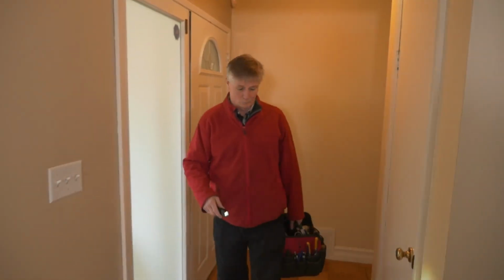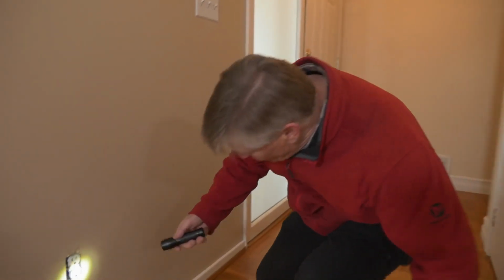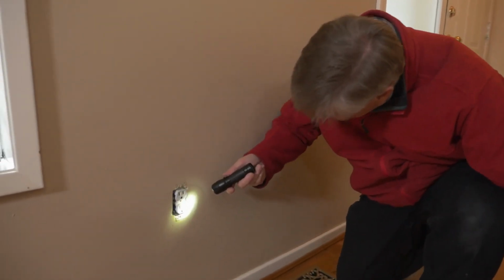Really, this is also the time that we want to have our home inspection. Let's say that you're building an inventory home. The builder is going to schedule your blue tape walkthrough for, let's say, a Wednesday. What you want to do is call your home inspector and try to get them out there on Monday or Tuesday of that week so they can run through the whole house and do the inspection beforehand. Then your real estate agent will give this report to the builder at your blue tape walkthrough. We usually email it in advance, but we will give it to the builder superintendent at the walkthrough.